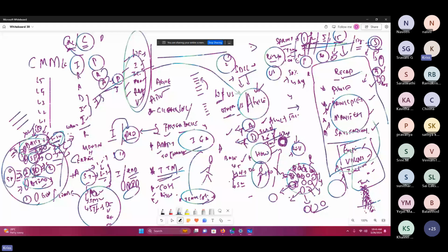They'll say that there is a sprint team and they'll have 15 people or 20 people in a team. But the framework sets a maximum of 9 people, because if you have more people, the cross connecting with the team members will be very less. Don't do this. No, my team has more members, that's the reason I have increased it. Okay, you create 2 sprint teams, 16, right? You divide into 2, 8 people each, working as 2 different teams. Operating multiple sprint teams is called a sprint train.